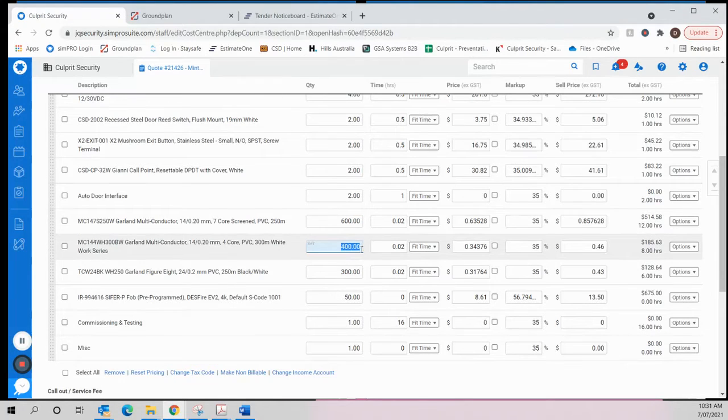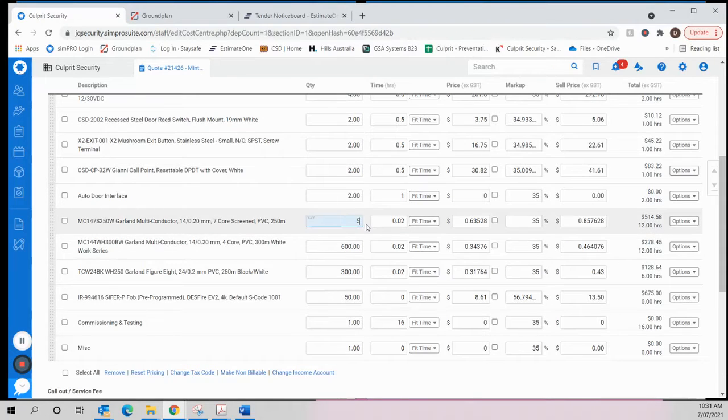the cable that we have allocated up to the full, not double, but you can see that they come in certain lengths. So the 250 meters, 300 meters, 250 meters. So that's the rolls that they come in, and we're just going to take it up to the next full roll just to make sure that we've got enough cable on site. And cable's not expensive, but we find it easier to throw in and make sure we've got enough cable there rather than having to go looking for it or missing out on some labour.